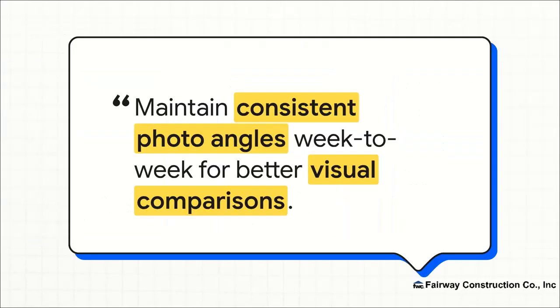And here's a simple but really powerful best practice. When you're taking progress photos, try to use the same angles each week. That consistency creates a much clearer and more effective visual story of our progress, making comparisons incredibly easy and valuable.